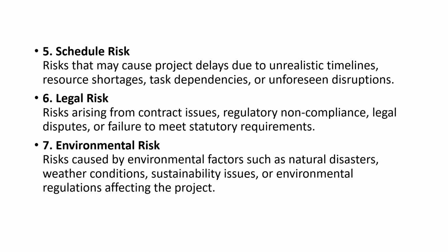The sixth is legal risk. These are risks related to contracts, regulations, compliance requirements, or legal disputes. For example, if a project fails to comply with regulatory requirements, it may face penalties, delay, or even project suspension. This is why legal considerations can also be a major source of project risk.